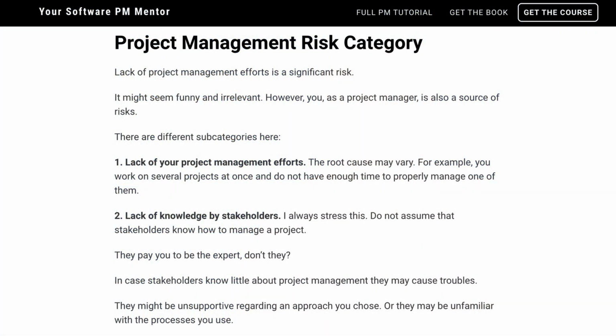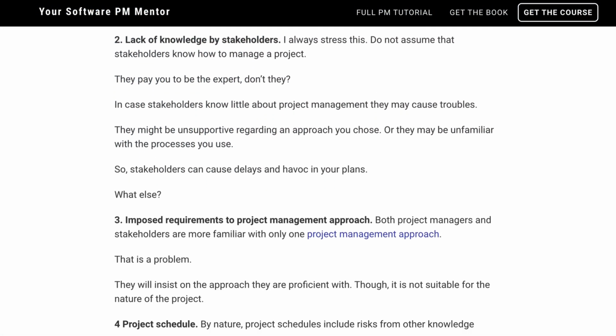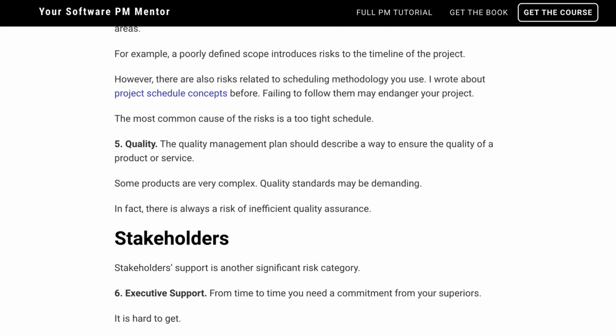This technique is inspired by collecting lessons learned process. But let me explain it. You see, most organizations carry out projects of similar nature. Processes and policies are the same. Some stakeholders never change. So a new project inherits all the same sources of risk from the environment. And risk categories are just a list of those common sources of risks of your organization.